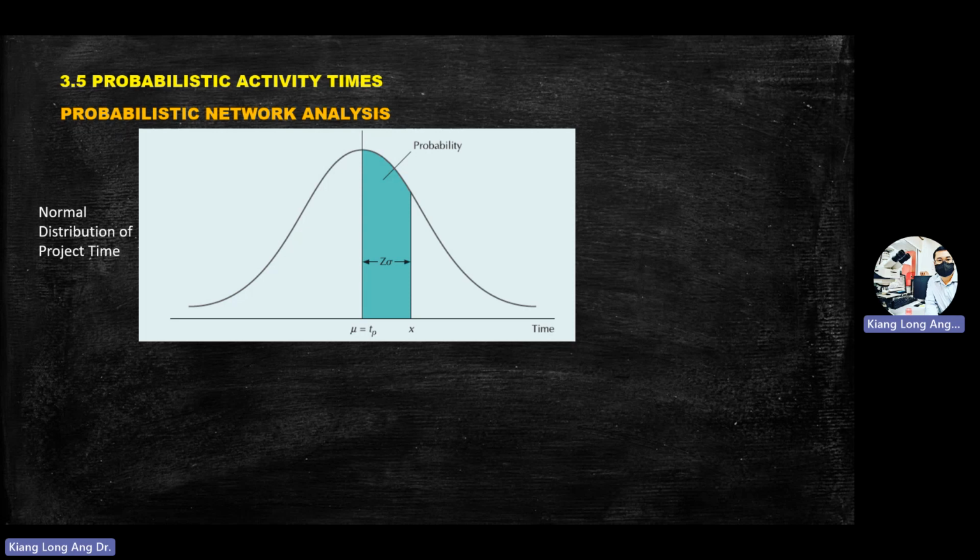Okay. Then you have a Z, sigma. Then you have this mu. You have x and time and so on. So the value of Z is x minus mu divided by sigma. Z equals x minus mu divided by sigma. Sigma you calculate by the equation just now. Just now it's a square. Sigma is a square root. You push the exponent to the right hand side. This one is a standard deviation.